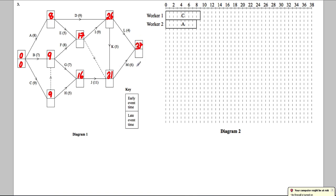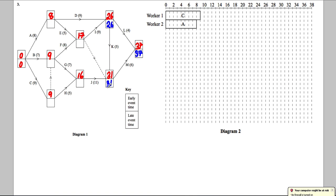For the final node, 26 + 4 = 30 and 31 + 6 = 37, so 37 is the project end time. Now we do the backward pass — we always write 37 at the end. The only way back from the last node is 6, so that node must be 31. For the next one back: 37 − 4 = 33 or 31 − 5 = 26; we want the smaller, so 26.